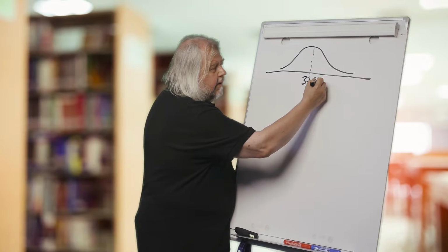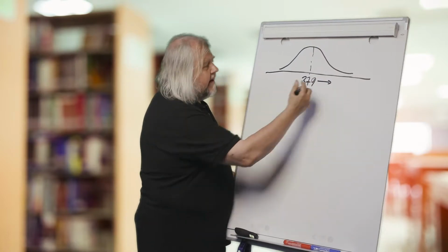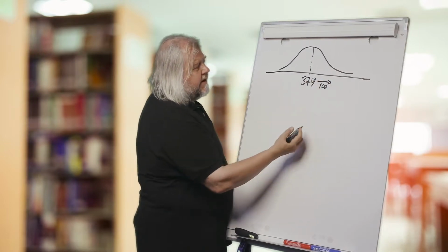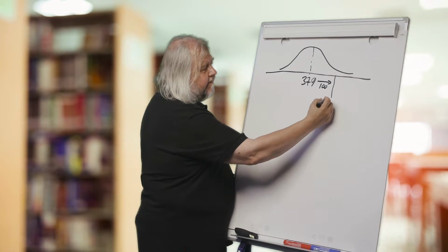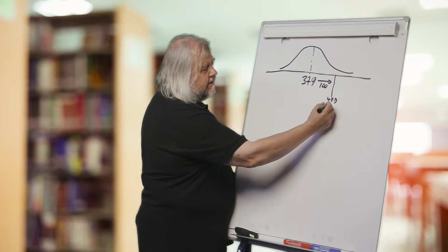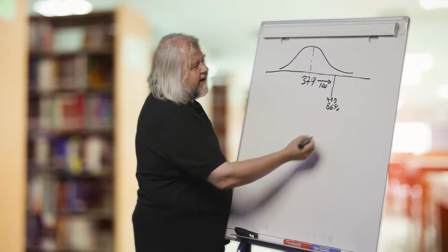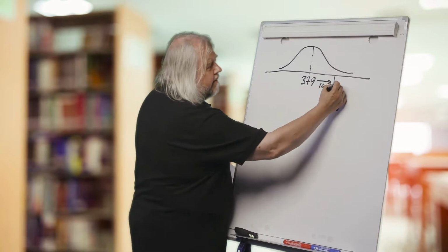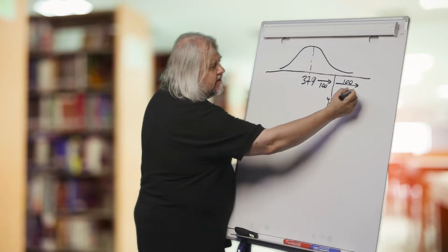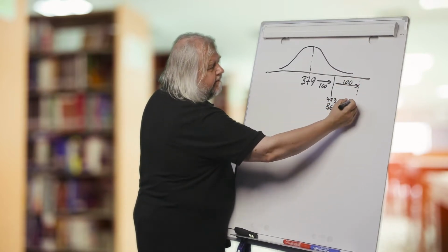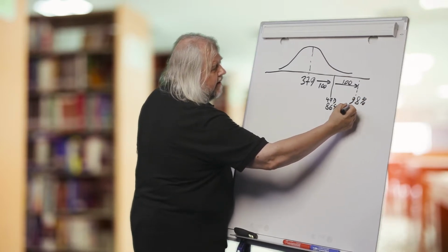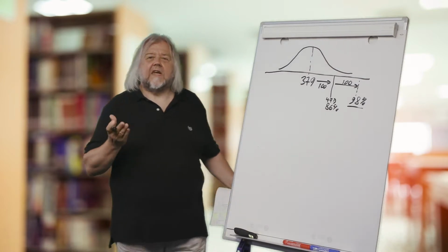Okay, we go one standard deviation further from this mean value, and we have 479, which represents roughly the 86% fractile. And if we go again another 100, which is the standard deviation, further from the mean value, we are about at the level of 98% of not exceeding that cost.